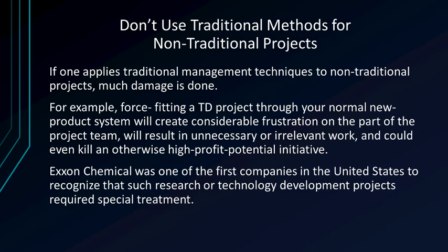In the previous lecture, we discussed why TD projects were so special. Another reason is that they are fragile. If one applies traditional management techniques to non-traditional projects, much damage is done. For example, force-fitting a TD project to your normal new product system will create considerable frustration on the part of the project team, which will result in unnecessary or irrelevant work and could even kill an otherwise high-profit potential initiative.